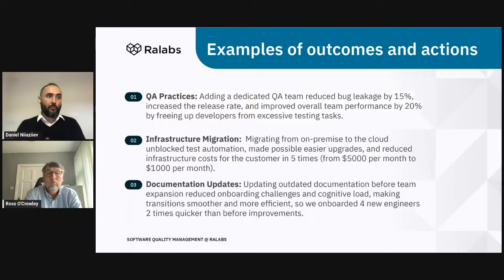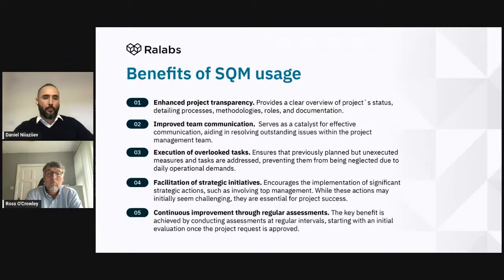Then we improved this. We had enough time to do this in advance, so proactively. And then after 2 or 3 months, we started this hiring, and a lot of people were onboarded. So 4 new engineers onboarded 2 times quicker than before the improvements. This is a practical example.